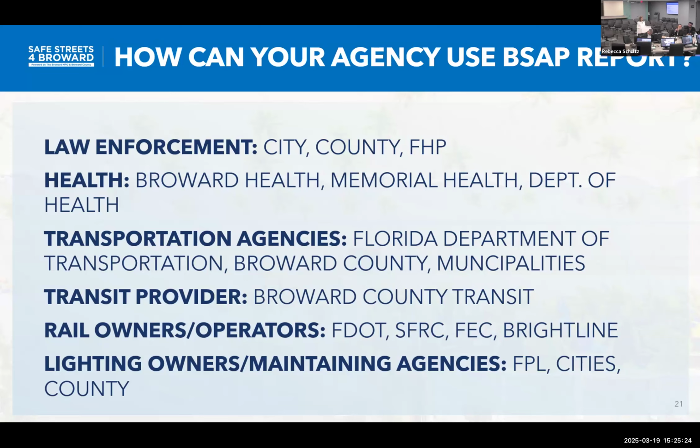Okay, we might repeat some of this stuff later, but as we're preparing to get projects incorporated in our 2050 Metropolitan Transportation Plan, and maybe Christopher, you might correct me if I don't get the details right, there's a holding area for projects that will come from the Safety Action Plan. And we expect to add those through an amendment process where we would have that in place by November to then get that on the list for this next year.